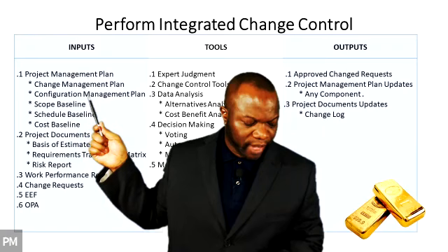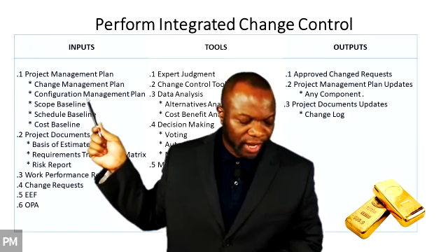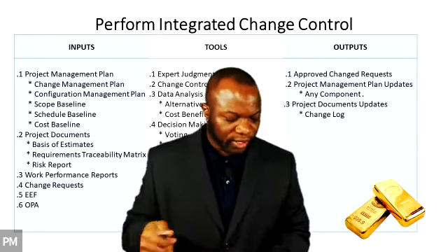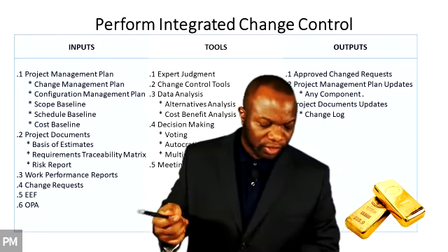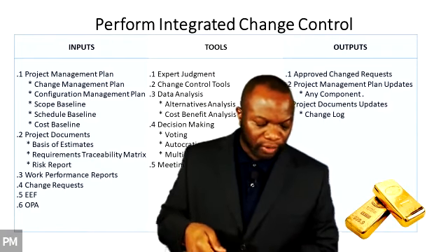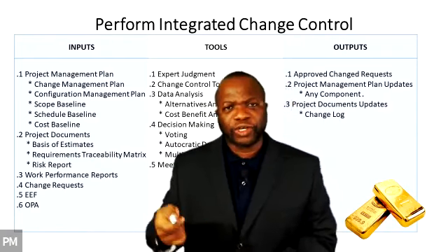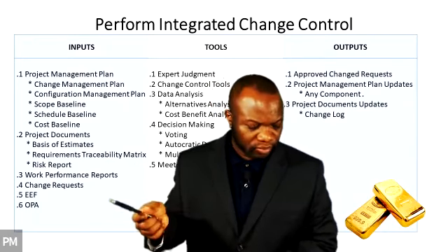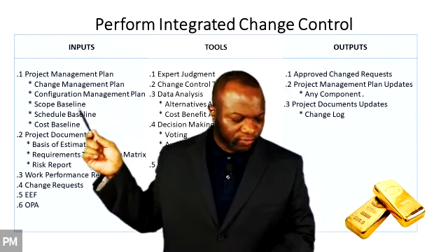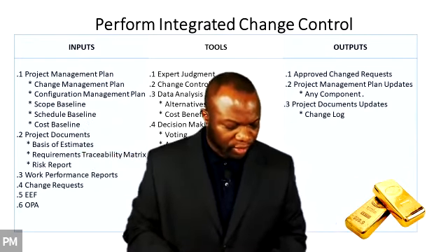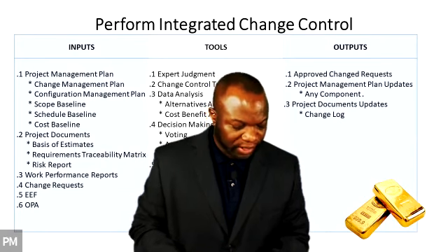Okay, configuration management plan, it says it describes the configurable items of the project and identifies those that will be recorded and updated so that the product of the project remains consistent and operable. So I said features and functions of the product. That's really what you're keeping up to date. The scope baseline, we've talked about that. Schedule baseline, pretty much straightforward, and the cost baseline.